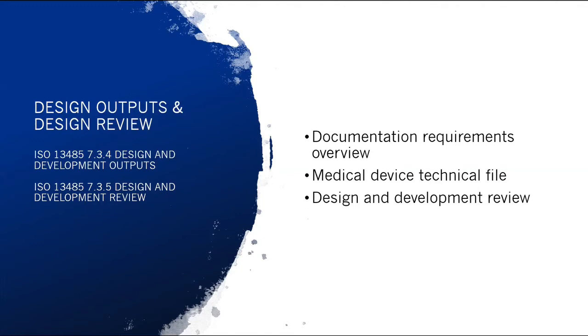So in terms of the dot points, the final dot point, design and development review. Throughout the development process, there is a requirement for multiple review points, definitely between stages of the development process, but also within stages. They need to be formal, documented and minuted, preferably with formal agendas. There are also other reviews which can be more ad hoc.